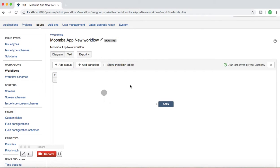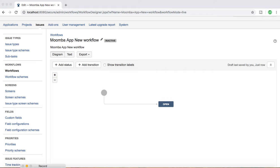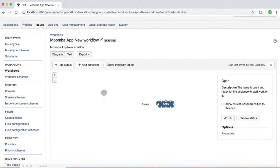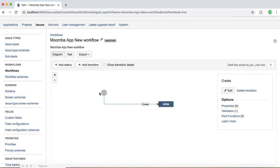As soon as you create a workflow it creates a status for you. The key components of a workflow — there are four of them. The first one is Statuses, which basically means where your particular issue is within the workflow. In this workflow, 'Open' is a status, and the line labeled 'Create' is a Transition, which is another key component.